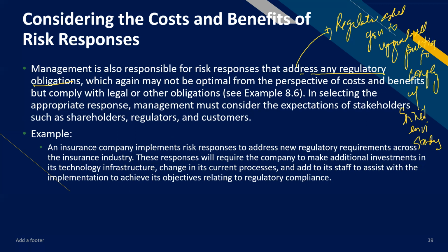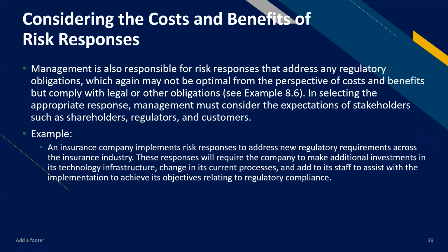Ang paniwala mo is kaya naman ng current mong operations to comply with the NVI standards. Okay? But because the regulator asks you to upgrade, probably you have no choice but to upgrade. So in that case, then cost-benefit analysis, wala na yan, right? Because you have a legal obligation to do so. Okay? Sometimes it's regulation, sometimes it's the industry dictating on you, right? That you have to do something.